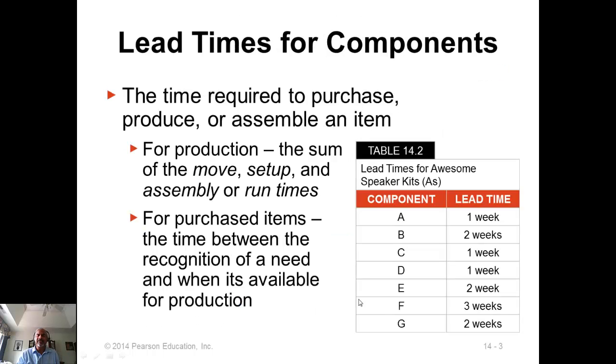If you simply add the lead times, you'll get 3 plus 2 plus 5 plus 2, 12 weeks. But in fact, the overall lead time is only 7 weeks, because some of those weeks are done in parallel.